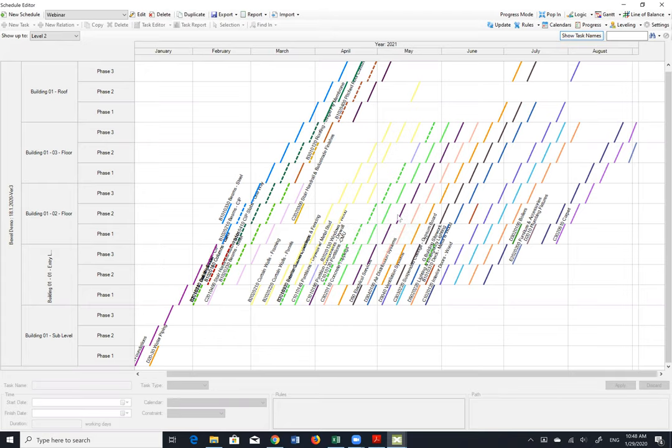And we can start from the steel beams or cast in place beams up to the carpet at the end. What is very important is that this flow line is like an assembly line in the car manufacturing industry. Unfortunately, we cannot move the building in the same way we move a car from the first activity up to the final activity. But what we can do is move the equipment and the labor in certain zones in a similar manner.